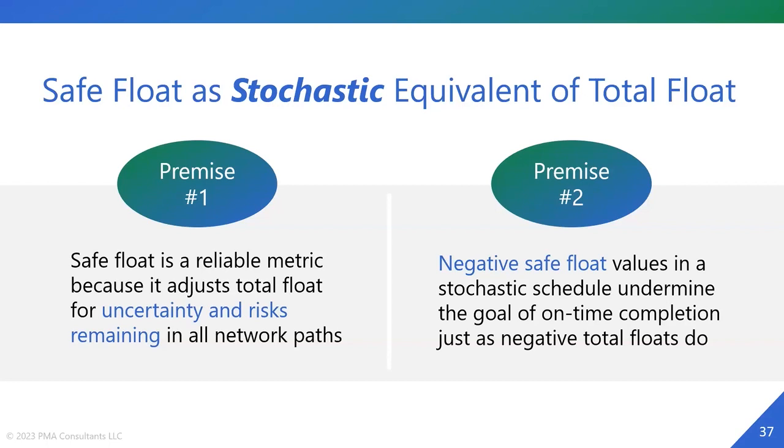But the really striking revelation of float risk assessment is that we can actually determine whether early start dates are actually too late. And this is a new concept that we become aware of if you accept duration variability.